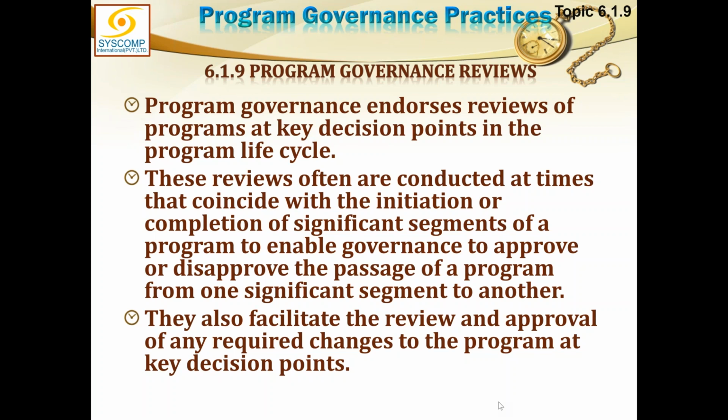Now, I think UK's system is much more well organized than what is explained in this program management standard, because they have got these reviews clearly defined. They call them gateways. So they have gateway 0, gateway 1, gateway 2. On every gateway, there are certain reviews to be carried out. And for that, they have certified consultants who can be authorized to do those reviews. So they are third party and they can conveniently do that.